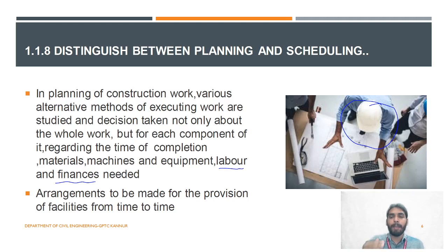As soon as the bar bending is over, what should be done? It has to be placed. As soon as the walls are constructed, you have to do the plastering. So he knows what will be the next step and all those things. That is planning. What are the steps? That also is planning.